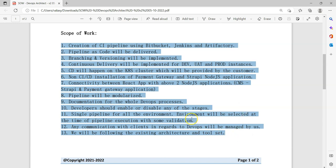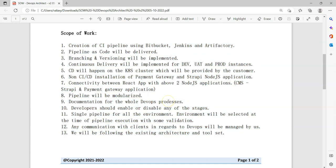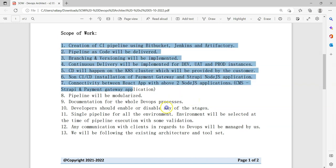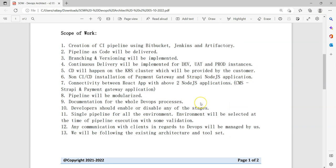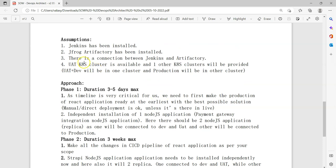If something is not delivered, he has a right to ask us to work on the specific task. Even if he is looking for some additional extra work apart from what we agreed, we can charge extra. So it will be helpful for both parties. Now what are the timelines we need to agree for this? That also we need to mention. And you can see here assumptions are also mentioned because they came and said that Jenkins is already installed, JFrog is already installed, so we didn't include these in our scope of work.